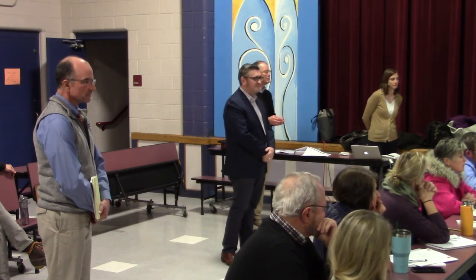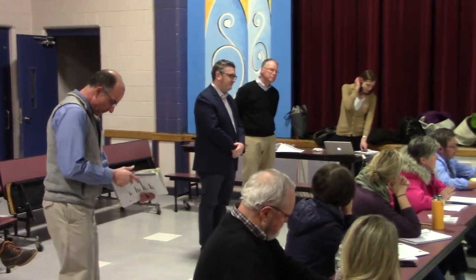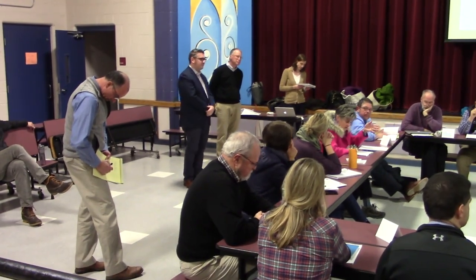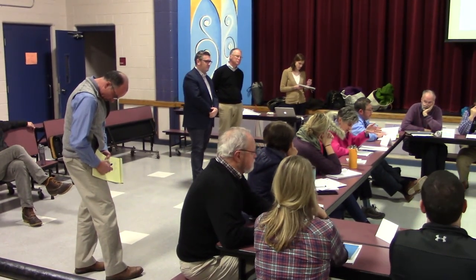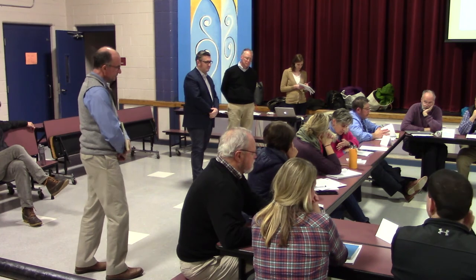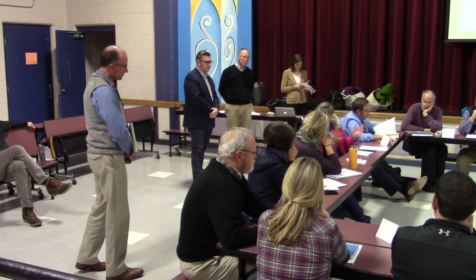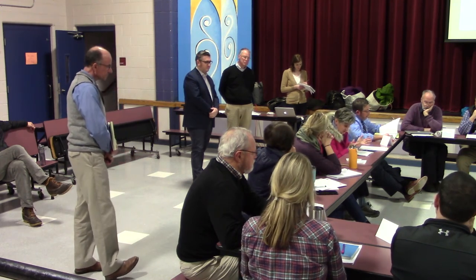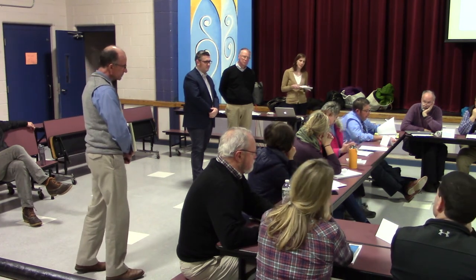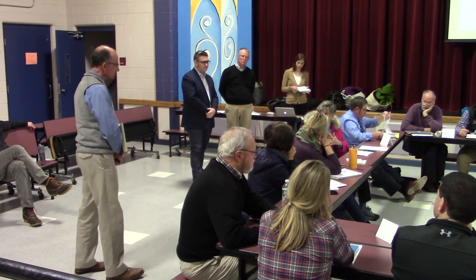Questions? Yes, Mary. So I have a question of how we can afford all this if Matt started off with a maximum debt today of $27 million. And then you talked about $300 to $450 a square foot for 106,000, and maybe you can right size it and make it 100,000. That would be for the middle school alone between $30 and $45 million. That's a big swag, but that's basically what I'm hearing you say.